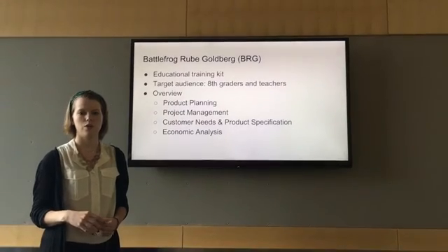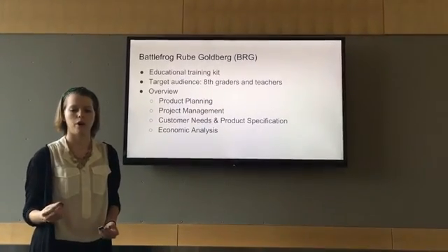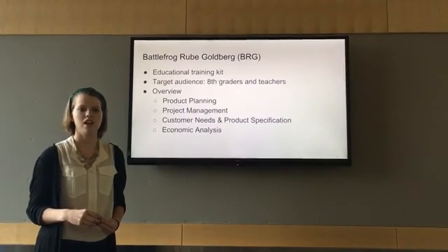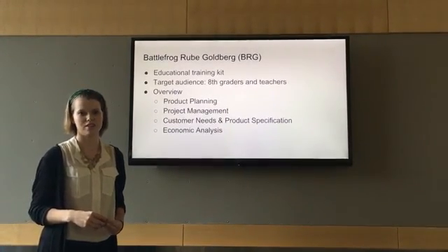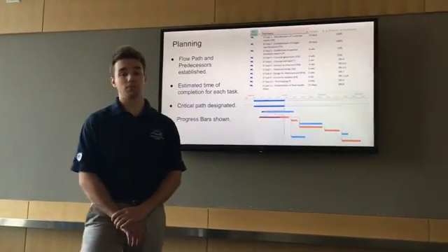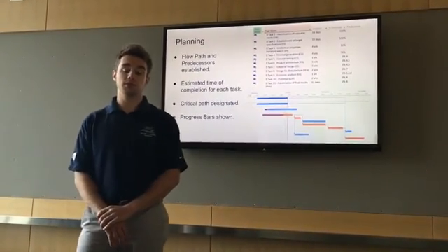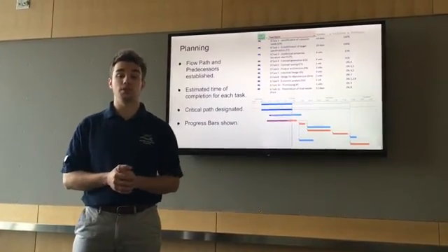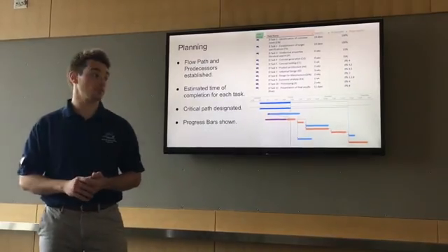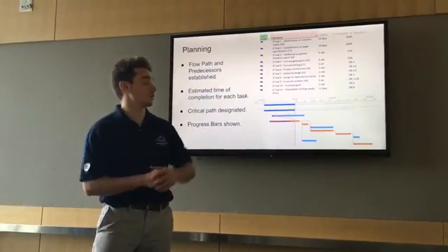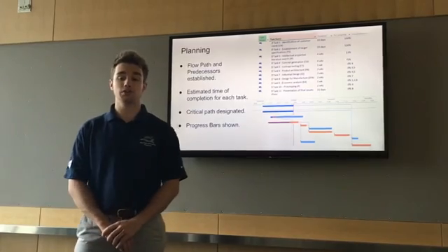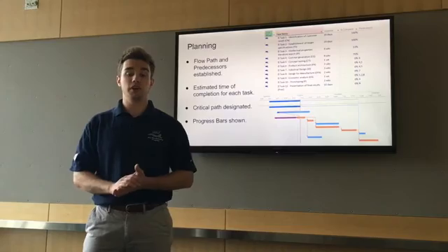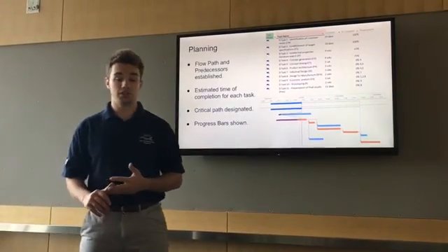This presentation will cover what we have done with our product planning, our project management, customer needs and product specifications, and an economic analysis. I'm going to detail our project planning. First, the team sat down and established what tasks were going to be required to complete the project. You can see these tasks, task number 1 through 11, listed in the top right hand of the screen. These tasks range from identification of customer needs all the way to manufacturing of the final project and delivery on the 5th of December.